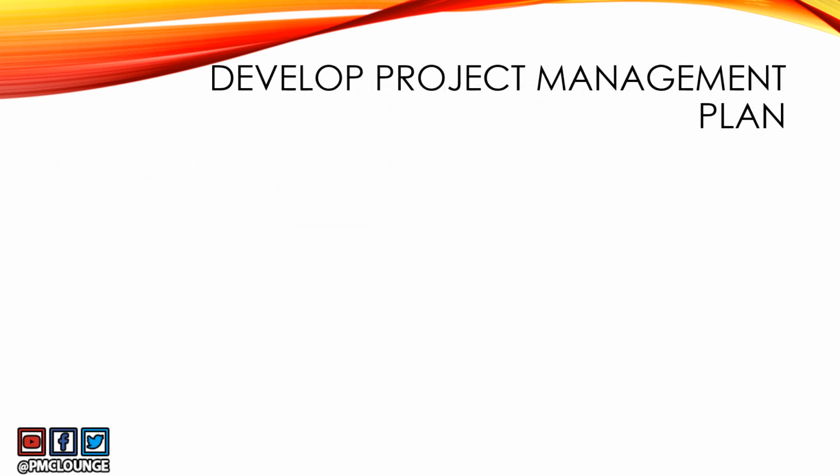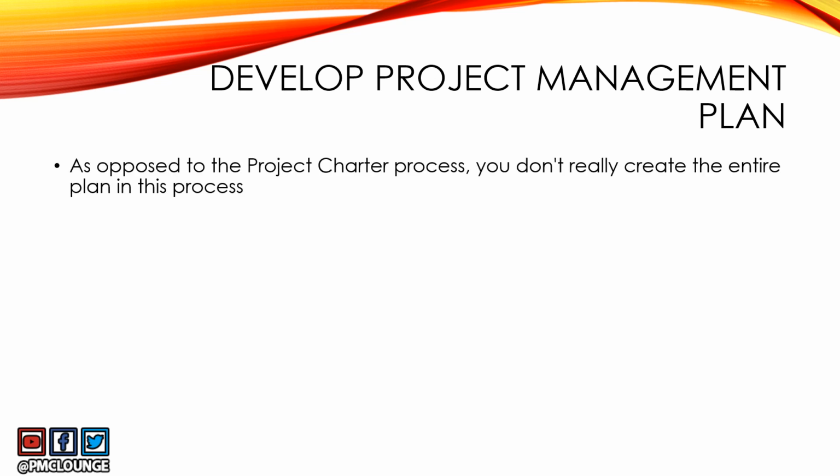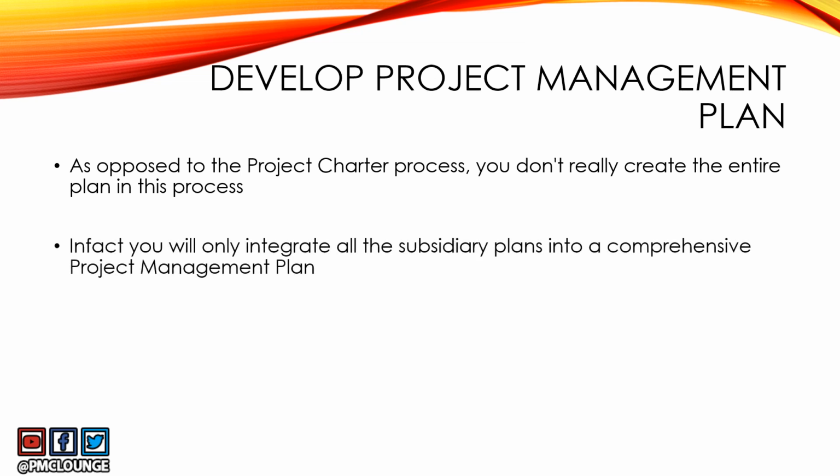The second process in integration management knowledge area comes in from planning process group, and that is develop project management plan. Now, this is not where you're going to develop the entire project management plan, as opposed to the develop project charter process, where you will develop the entire project charter. But here you are basically putting together the subsidiary plans that are created as part of other knowledge areas. So you have subsidiary plans.